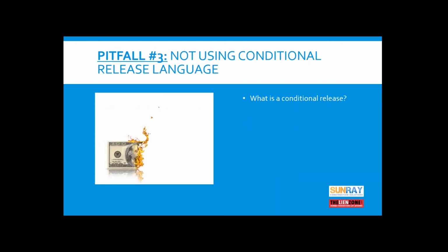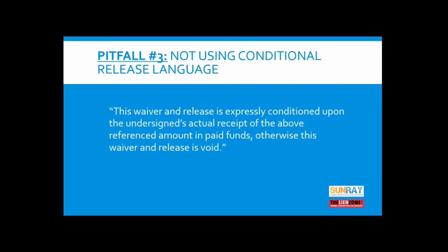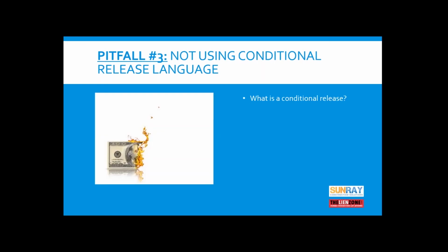Pitfall number 3, not using conditional language. So what is a conditional release? A conditional release, and here's the language for a conditional release, which says this waiver and release is expressly conditioned upon the undersigned's actual receipt of the above referenced amount in paid funds. Otherwise, this waiver and release is void. So if you are giving a release before you are actually receiving payment or a check, you should use conditional language in your release.